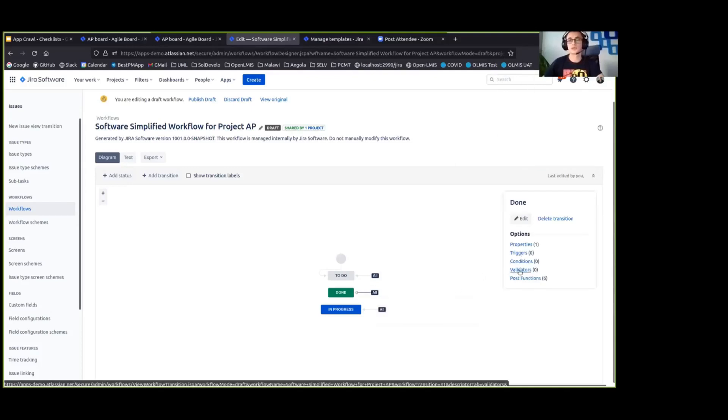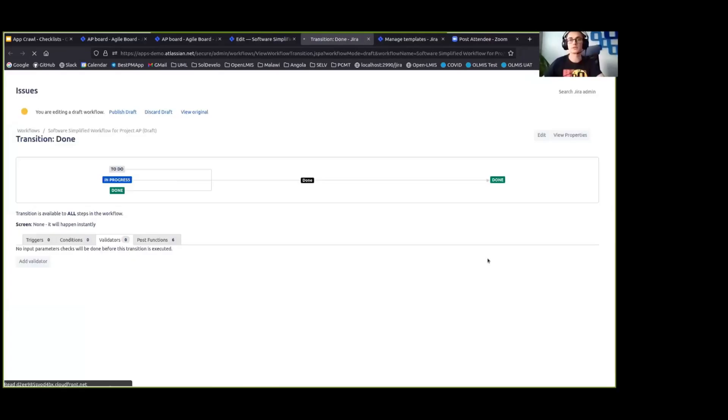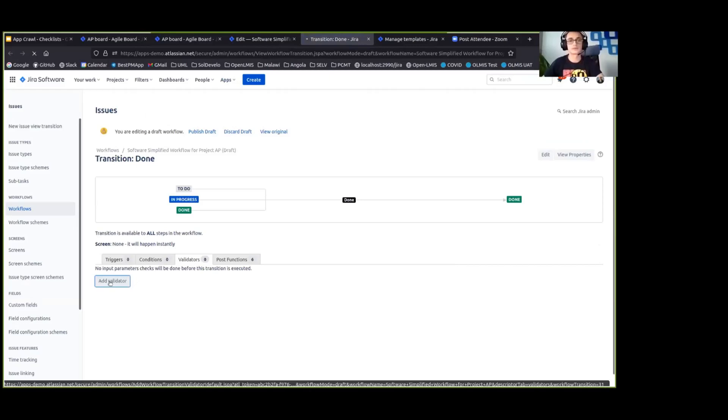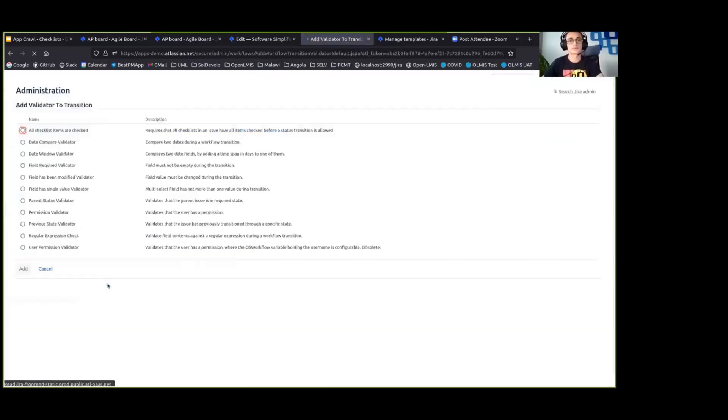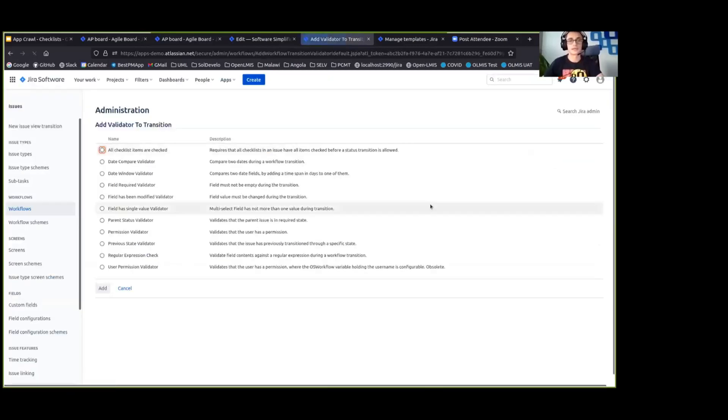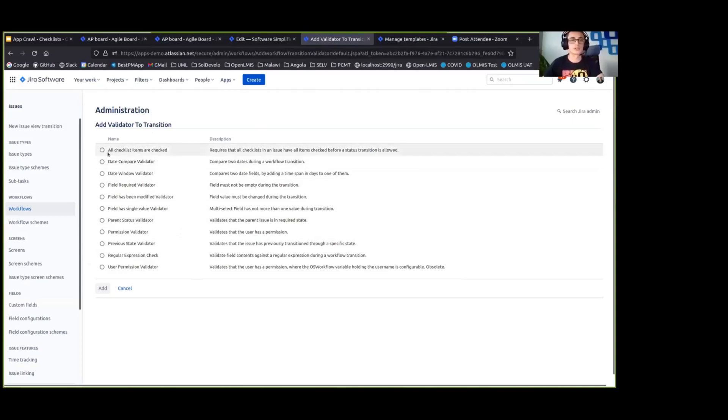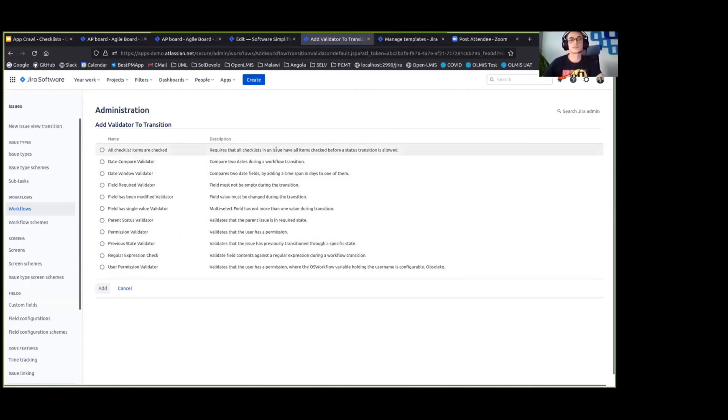We are selecting the validators and we are adding a new validator here. And on that list of all of the available validators for this project, we are seeing that there is one that is called all checklist items are checked and that validator requires that all of the checklist items in this issue are checked before we can transition the issue to this status.